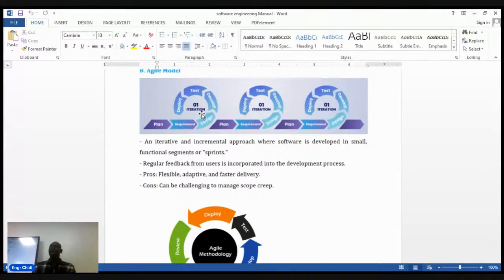If there is another aspect, maybe the report side now, maybe the VC wants to be seeing students that are owing, those that have paid, those that are going to graduate. Also, each module is called sprint. So what Agile does is when you have a large project, Agile will help you break it into small modules. And each module you do it, deploy it, test it, review it, continue again until you are done. You move to another phase, going around.